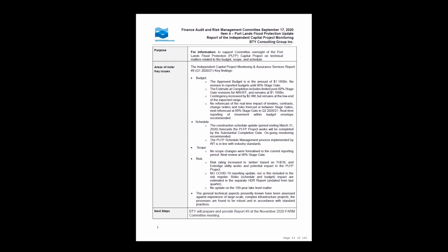On the schedule side, you had noted that you feel there's still wiggle room, I guess, ability to reschedule. Is there one big master schedule? Because it sounded from your report like there are multiple schedules, and it looked like you attempted to consolidate it. No, there is one schedule. I think what you're picking up on is that there are different critical paths within that schedule, based on how many days are associated with that path. But basically, to summarize, we're satisfied that this time it's still tracking as reported.